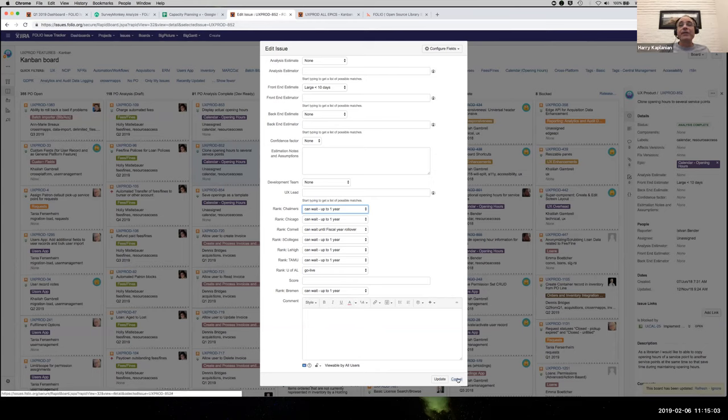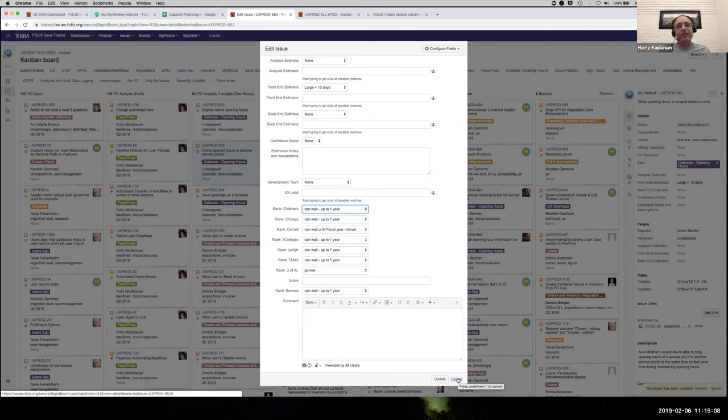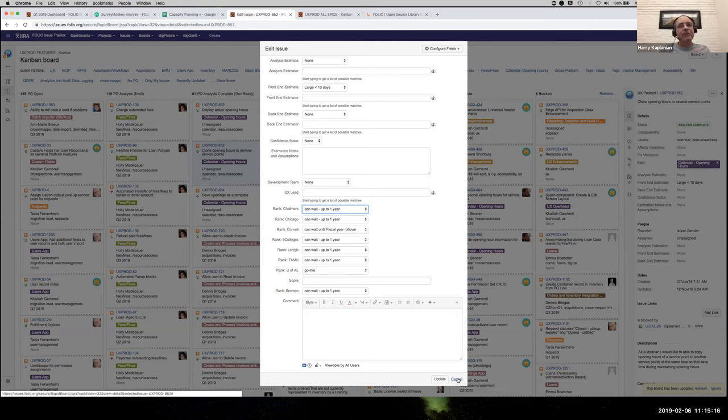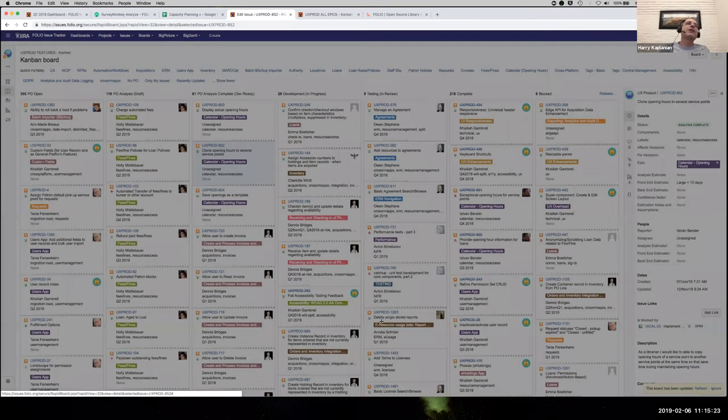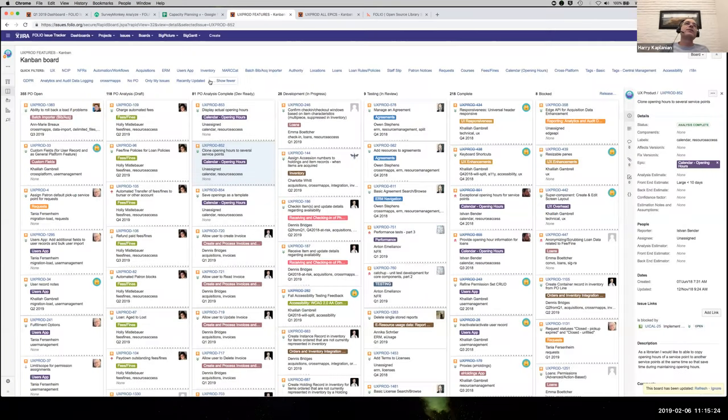But the libraries that are involved in this community do help us prioritize these. And this is really, really important because again, why should we build things, especially if most libraries don't believe they're needed to go live. And also when we look at the overall schedule in terms of when these libraries expect to go live, we can also use that as input as far as how we prioritize these features as well. So what we do then is all this data actually loads into a Google Doc, which we call our capacity plan.